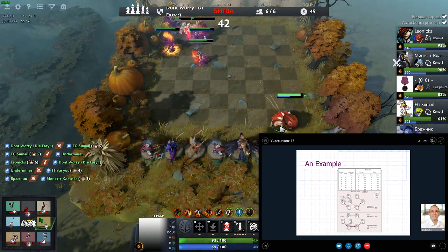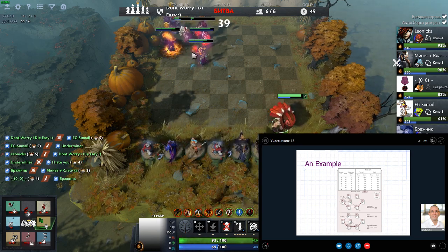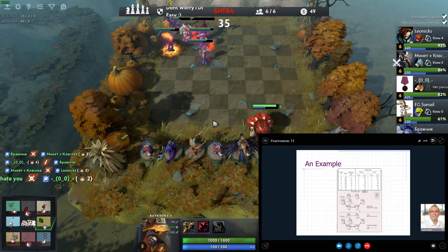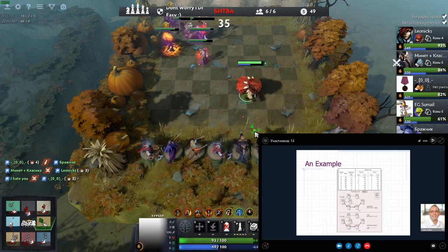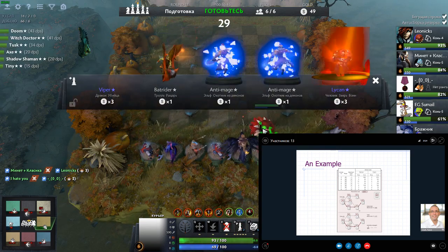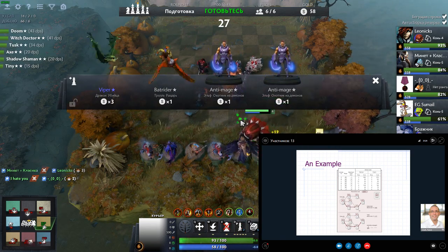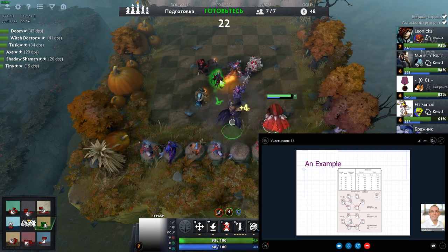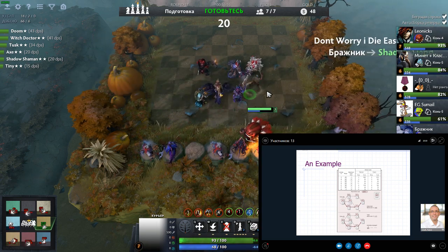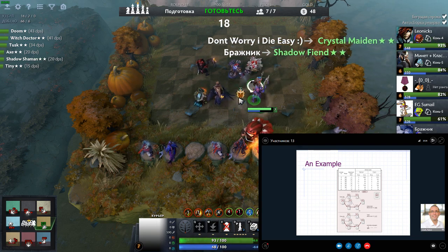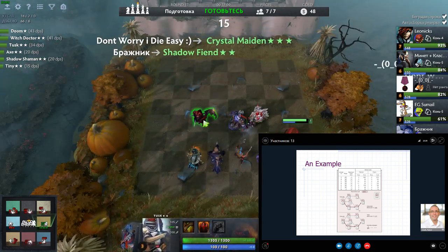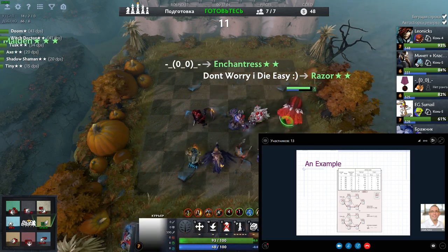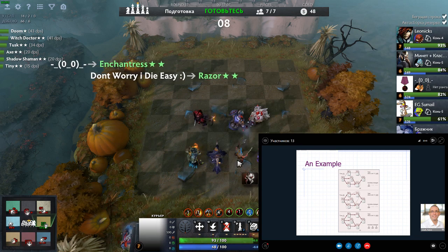The other really, really important thing, and I haven't mentioned it yet, is the activities that you crash must, absolutely must, be on the critical path for the network. Remember, this is the shortest pathway through the network, and if they're not on the critical path, they're going to have absolutely no impact on the duration. So it's really, really important that you have them on the critical path of the project. So there's an example over that slide and that slide that you can take a look at when you get some time.